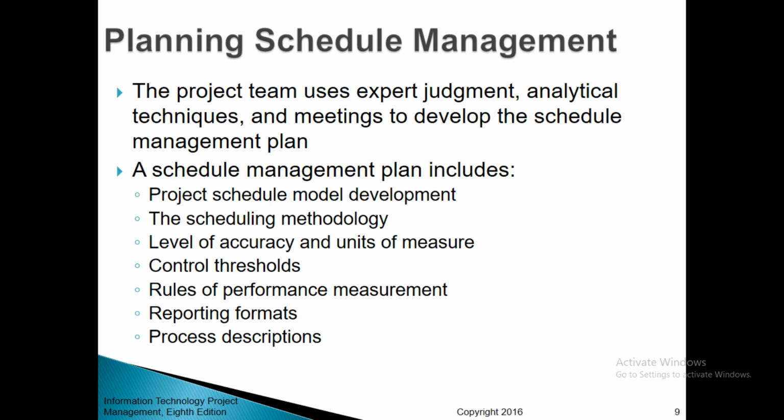A schedule management plan includes: number 1, project schedule model development; second, the scheduling methodology; third, the level of accuracy and units of measure; fourth, control thresholds; next, rules of performance measurement; next, reporting formats; and last, process descriptions.